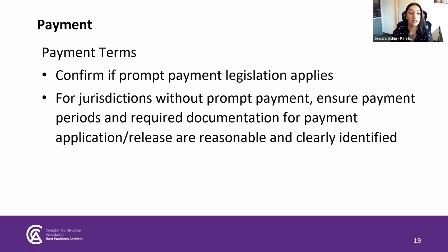Another way to mitigate risk is to establish a lien holdback trust account. This ensures that there is a balance check which matches the holdback deduction for each progress claim. So any discrepancies should be reported in writing right away to be remedied prior to any credit concerns. While these concerns have largely been addressed in jurisdictions with prompt payment legislation, it remains an important consideration in jurisdictions